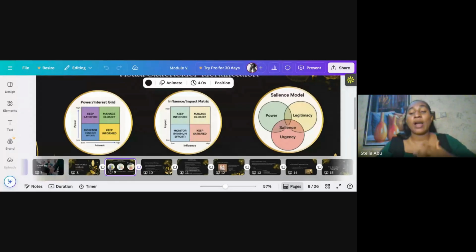So basically, why I want you to know that is what kind of strategy will you give them, right? If your CEO is calling you and your head of department is calling you, who should you respond to first? Sometimes we feel like we know these things, but when you are in the middle of conflicting interests, which always happen for a project, somebody that has high power and high interest is telling you do this, and somebody that doesn't have that power is saying do this. Because you know the strategy, it's easier to manage it.